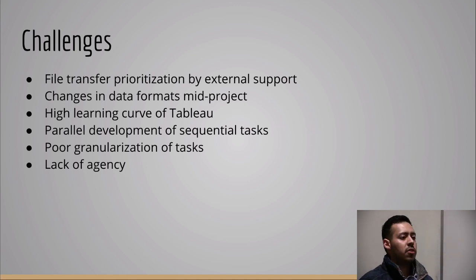And our task creation also needed some refinement as well. Initially, our tasks were too large to keep track of, and were not small enough to complete in a timely manner. And so that also affected our productivity. And last, because our project will be maintained by ITS after this iteration, we had to follow their guidelines and standards, and this gave us less flexibility on our technology choices.